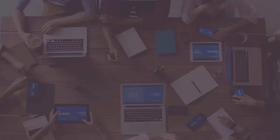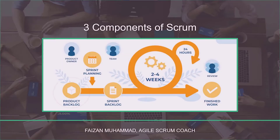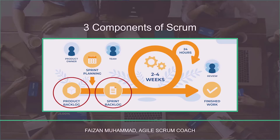All of this will be documented as well. The two most important documents are the product backlog — an artifact used to manage and prioritize all the known requirements of a scrum project — followed by the sprint backlog, which is an artifact to keep track of the requirements committed by the scrum team for a given sprint. That's it for this lesson.